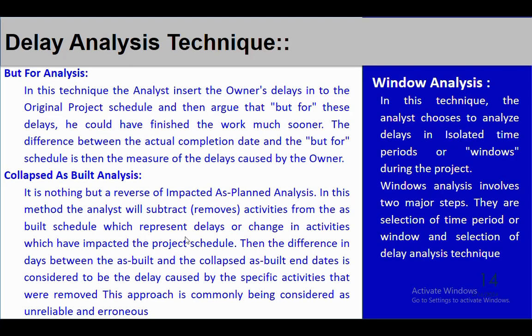Window analysis. In this technique, the analyst chooses to analyze delay in isolated time periods or windows during the project. Window analysis is nothing but a time impact analysis. The only difference is the whole project is divided into isolated time periods. It could be a prospective time impact analysis or a retrospective time impact, as built versus as planned analysis. Any analysis where you are not analyzing the whole project at a time. Instead of that, you divide the total project duration into windows of equal intervals.